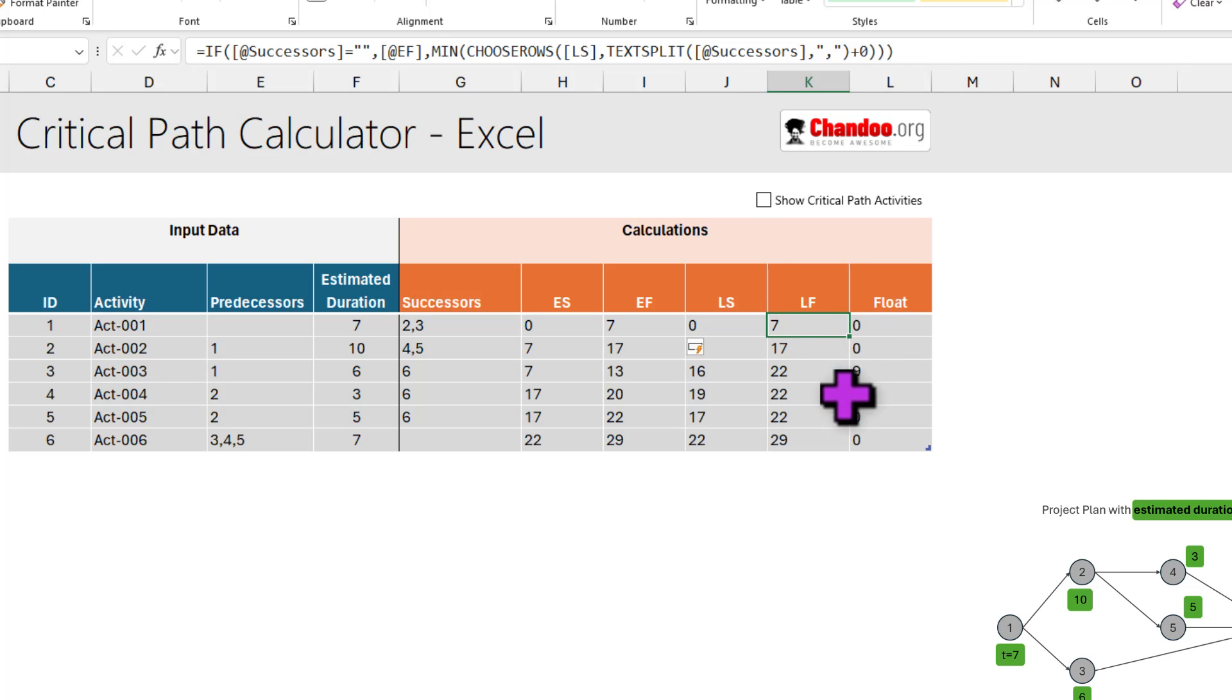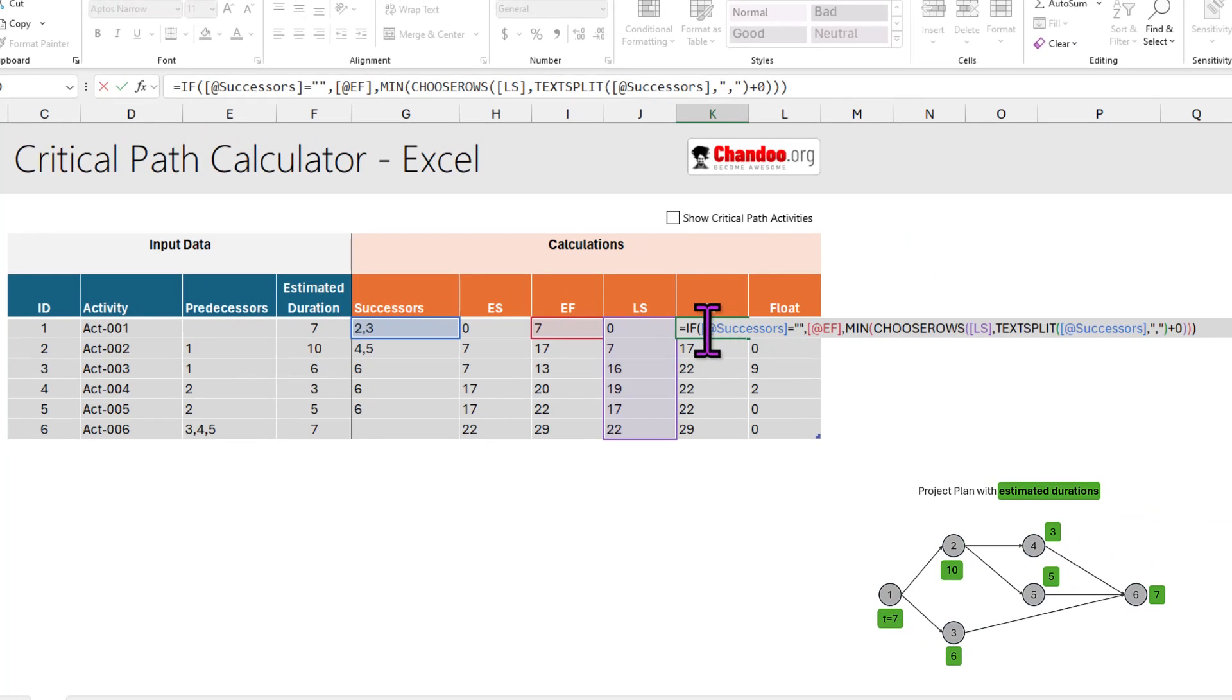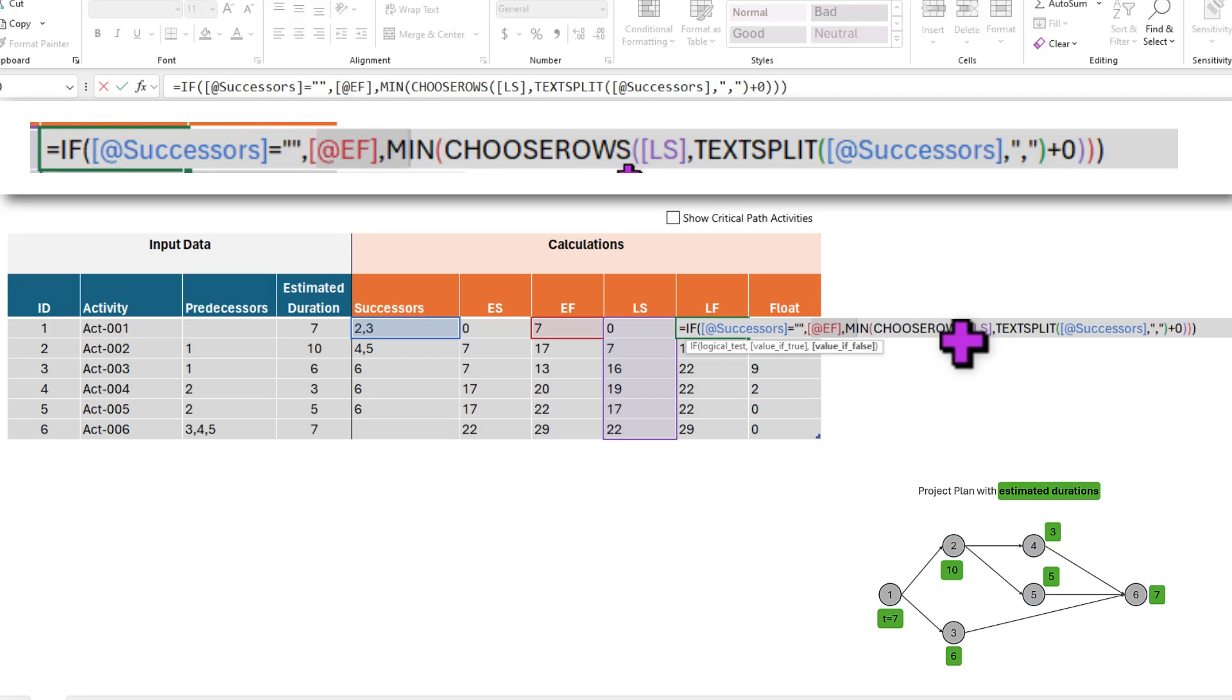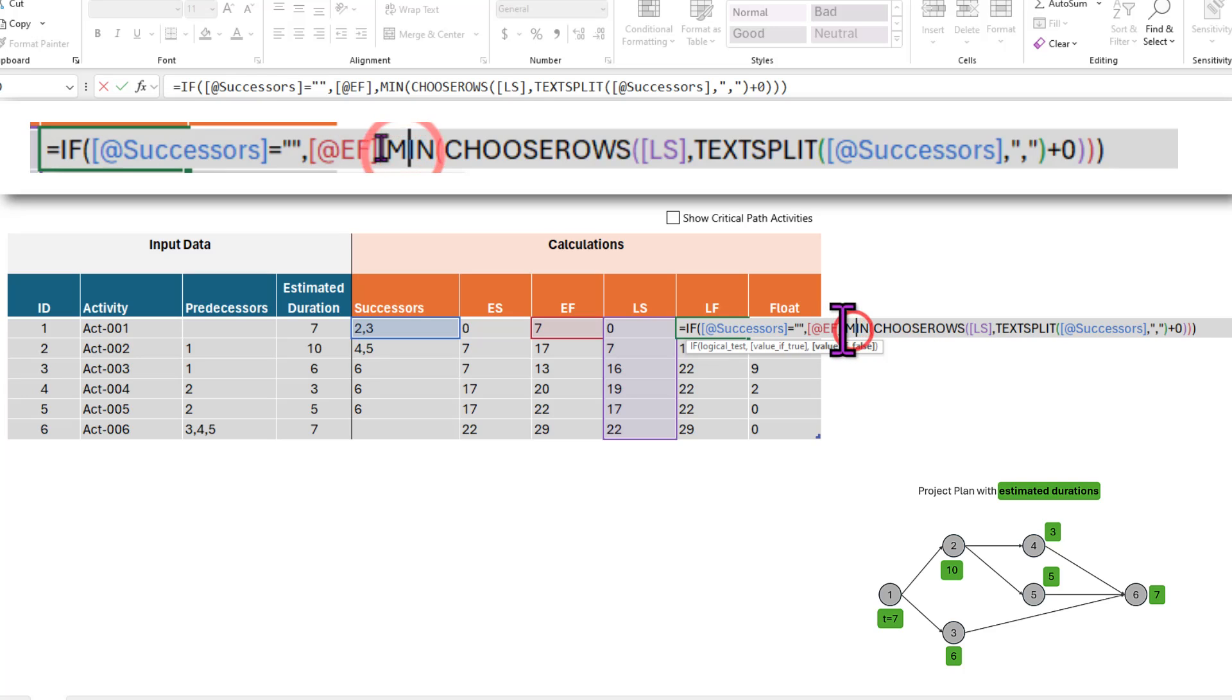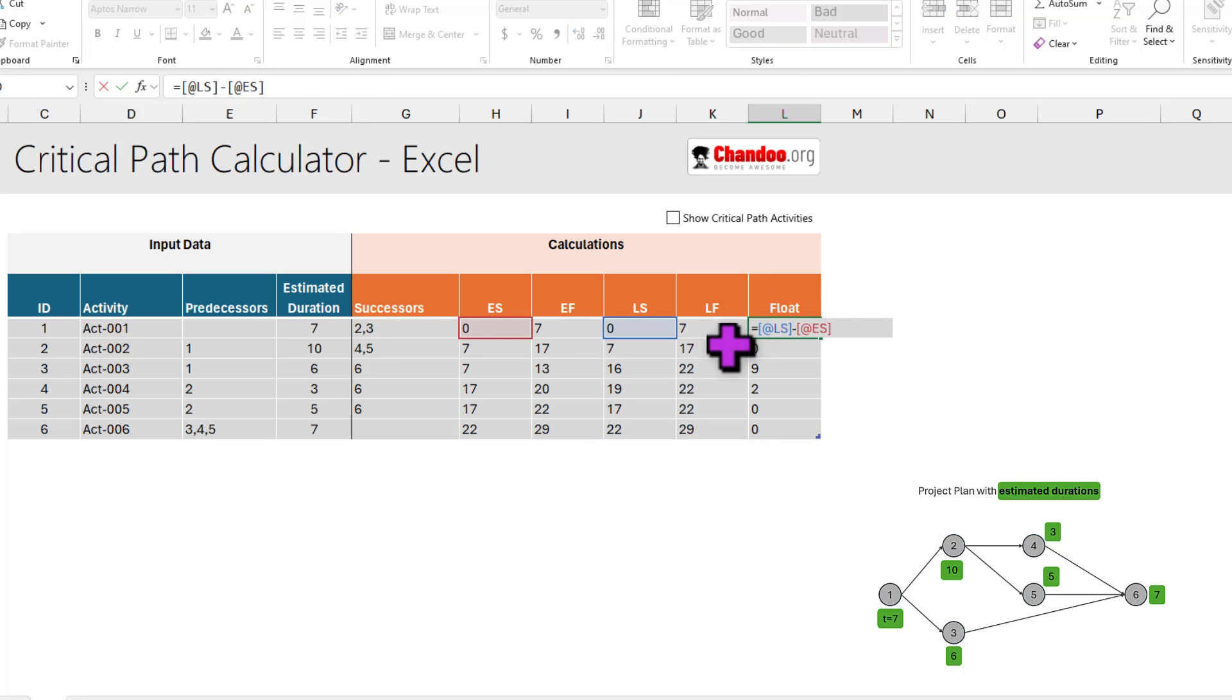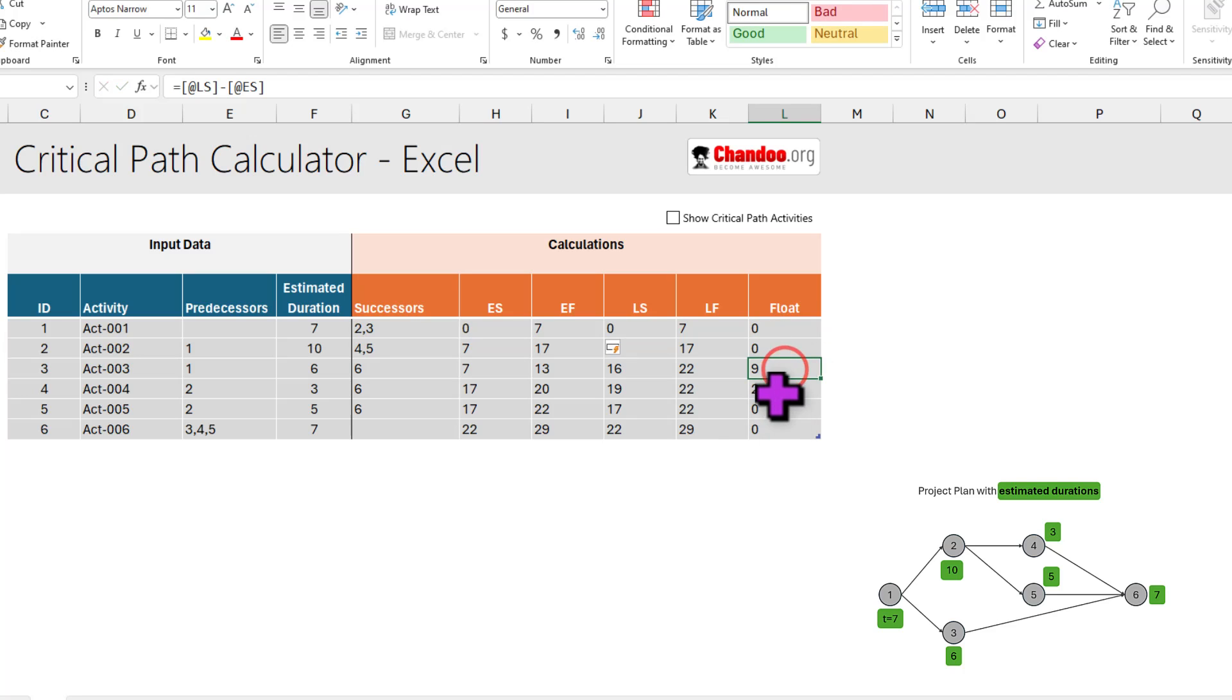So we reverse the same flow for LS and LF. Here the calculation begins with LF first. So here we are saying if I don't have any successor, then my finish time is same as the earliest finish time. So earliest I can finish would be same as latest I can finish. For all other things, it will be the minimum of all my latest finish values. So it's the opposite, but we are going from back. And finally, we calculate the float, which is nothing but LS minus ES. You can do it on S side or F side. It's the same way it will work out and you will get the float on each activity.